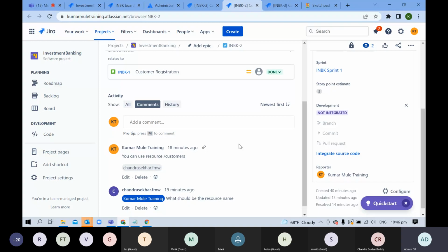I used to create stories for the API team, and estimate how much effort, how many resources we have, how many story points we can cover, and who will work on which story. Sometimes the testing team used to come and push me, please complete this story also. Then I used to re-evaluate whether we can shuffle any task from each other or not.